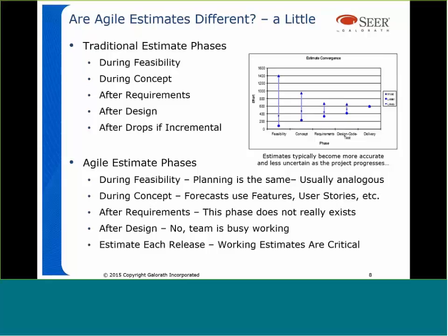During the concept phase, you start to know a little bit more about what you're building. You probably have some business requirements, so now maybe your analogies can be a little bit better, or maybe you can start inferring some type of size based upon the concept documents. And then after requirements, boy, you can knock out a function point count after you finish your requirements.